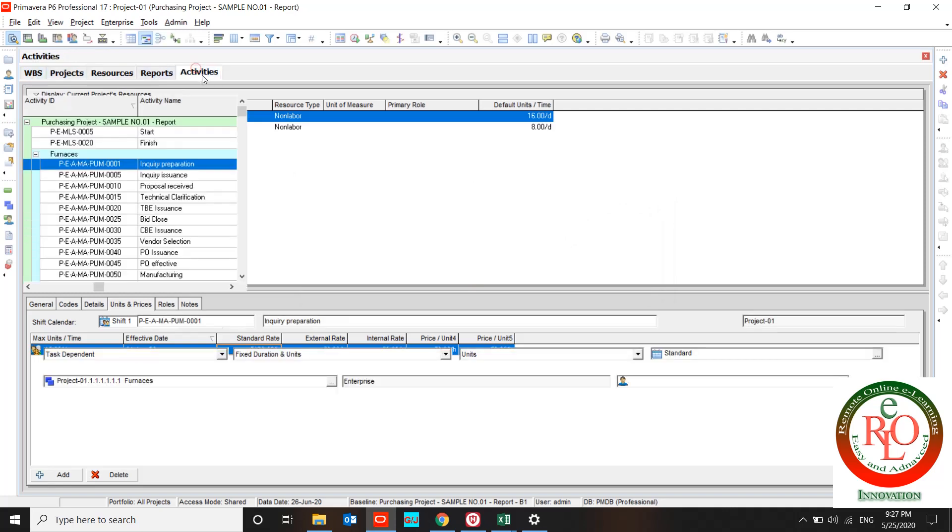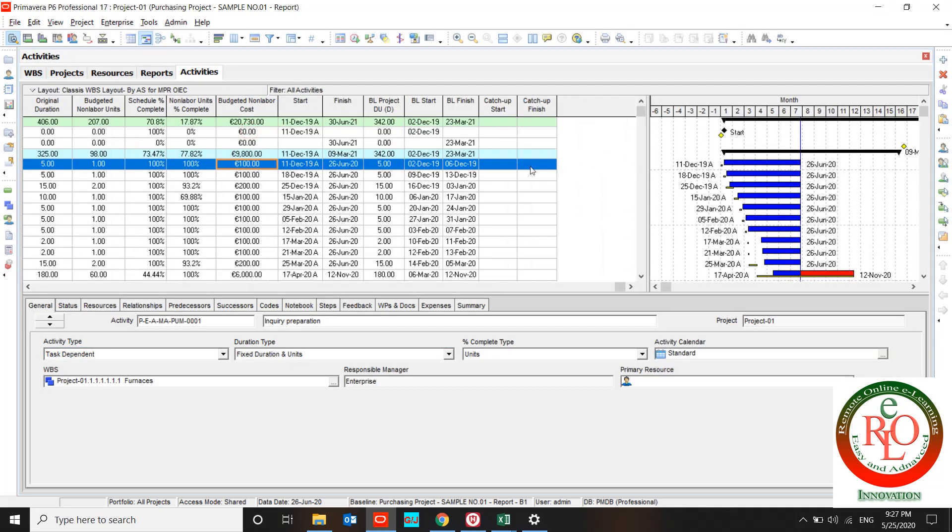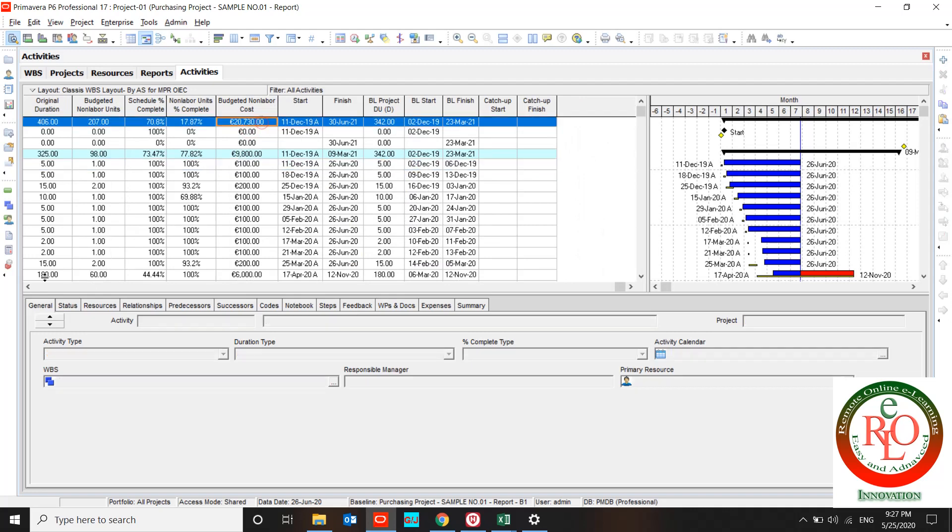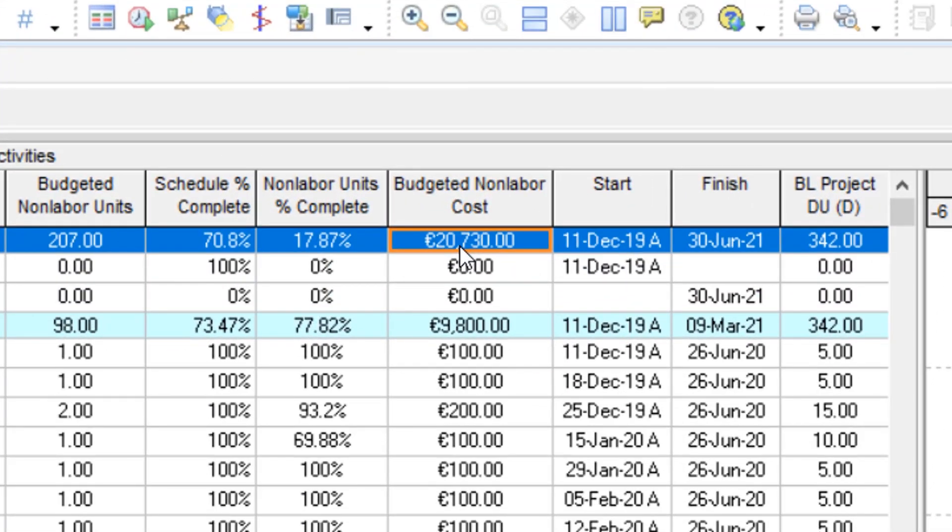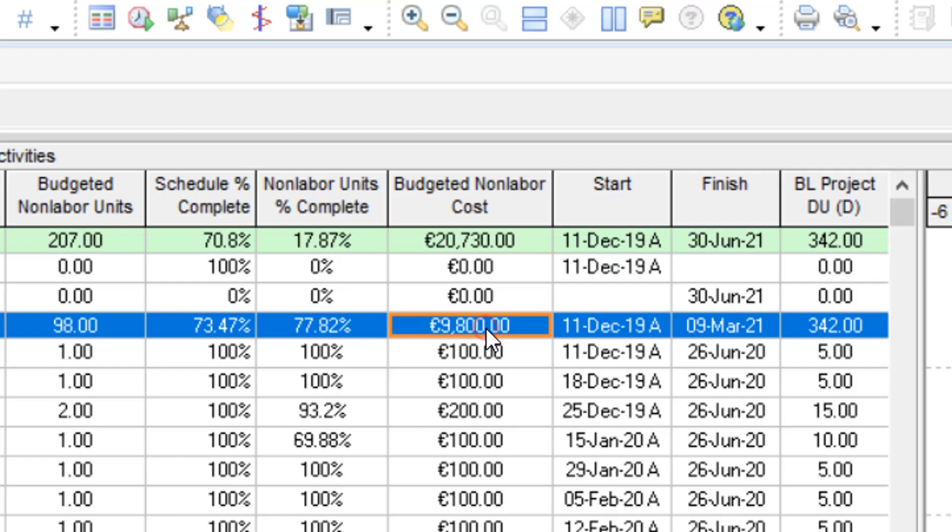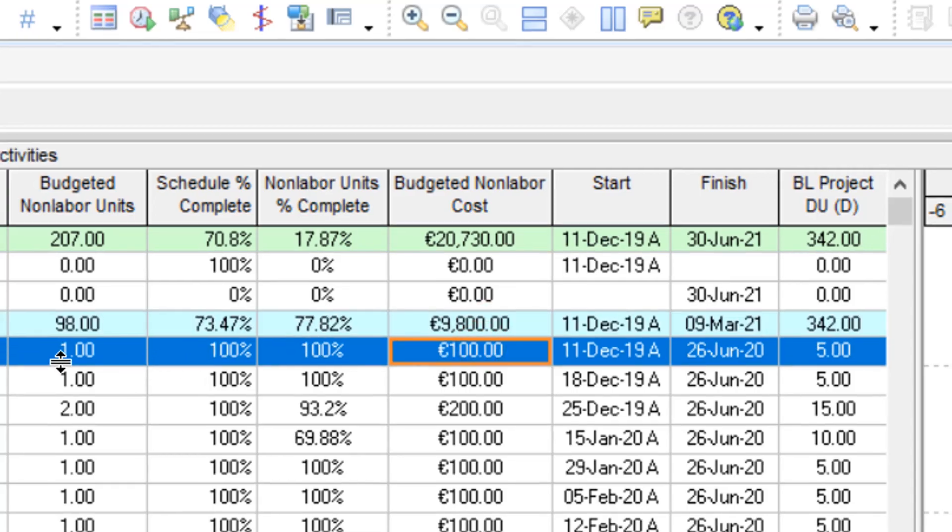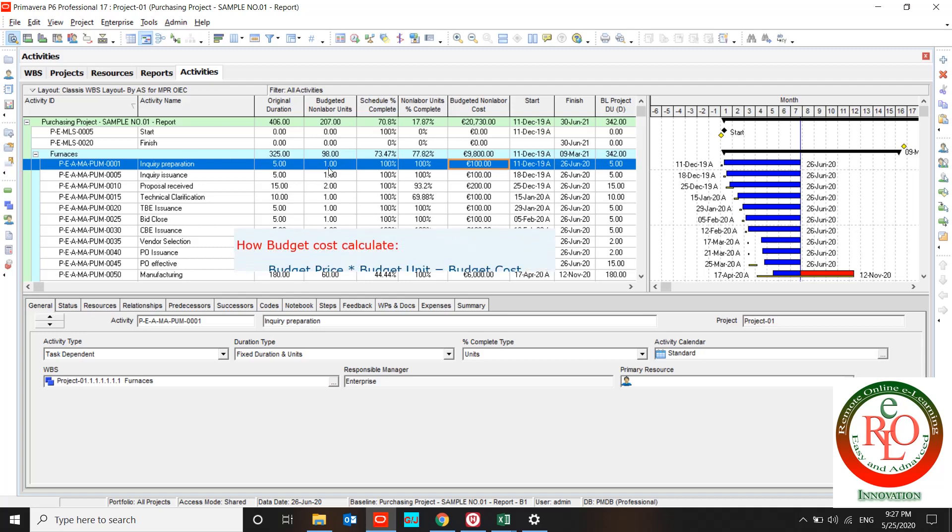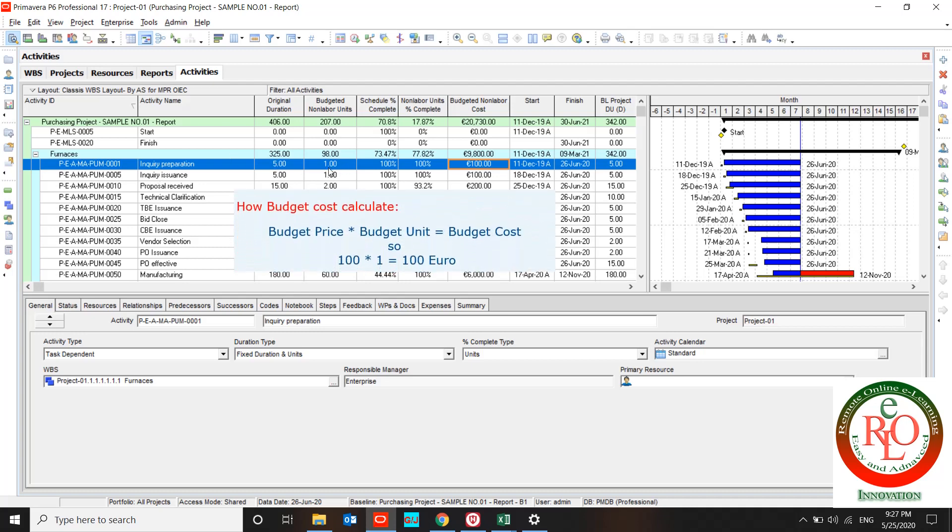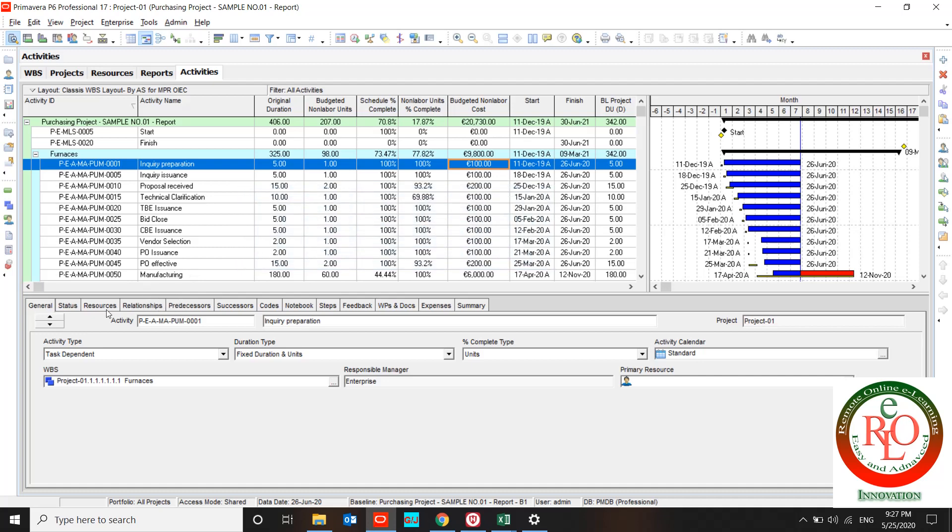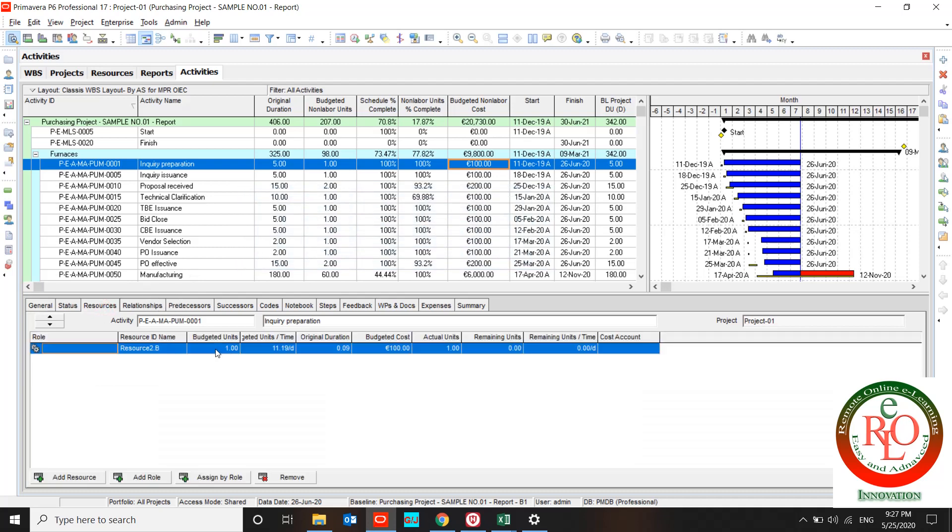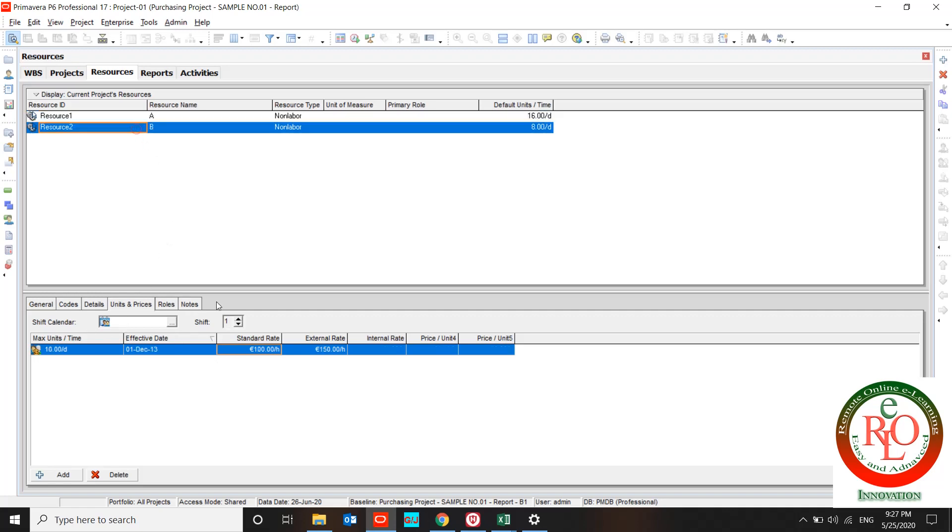If I go to activity sheet, you can find budget non-labor cost over here. This activity budget is 1, and budget non-labor cost is 100 EUR, because the resource price is 100 EUR per hour.